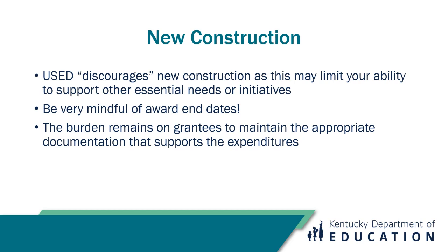Will you be able to get concrete? Will you be able to get all these things you need? Or is there going to be long delays in that? And those delays could push you past that deadline, and that creates a whole other set of problems that we don't want any district to deal with. So always keep that in mind. And that's why I say be very mindful of award end dates. That's probably one of the biggest things you can think about with construction.